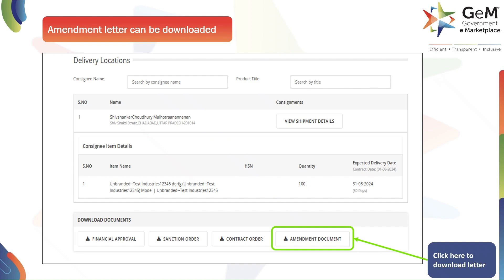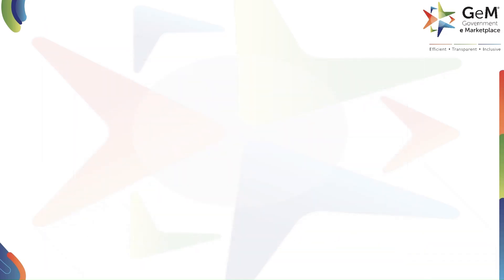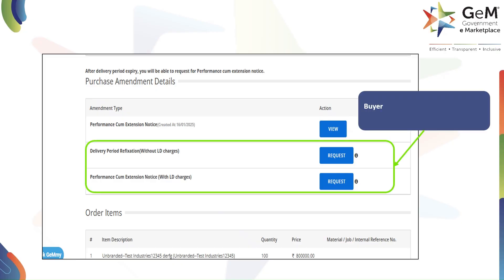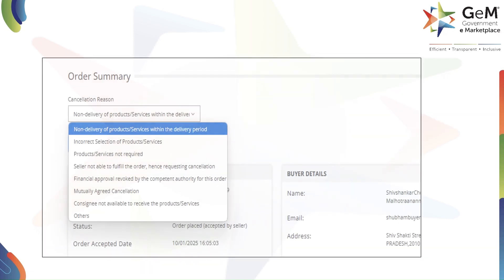You can download the amendment letter by clicking on 'Amendment Document'. After the delivery period ends, you can request changes. You have two options: delivery period refixation without liquidated damages charges, which changes the delivery date without penalties; or performance cum extension notice with liquidated damages charges, which extends the time with possible fees. Click 'Request' next to your choice.